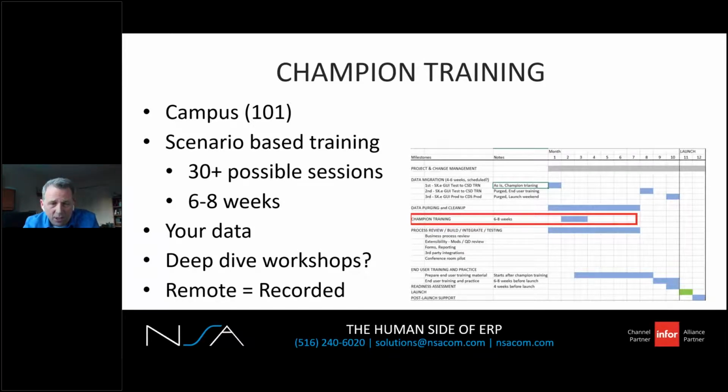There's a lot. So from a few hours each for some what's new training, like what's changed between GUI and CSD, to as much as a day or two of training if you're taking on a new module. Overall, plan for about 6 to 8 weeks to complete your training. Best practice is training done on your data, right? We also encourage practicing immediately after the training. So for this reason, don't try to cram all your training sessions in a very tight week or period.